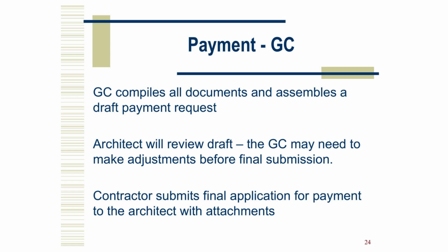Two, reconfirm retainage math line by line and in total. Three, confirm stored materials location, title, and insurance. Four, scan for activities over 90% complete and prepare closeout notes. Five, validate that change orders are integrated into the SOV and not orphaned. Send a clear cover email with the submission. State the period of work, call out notable changes, flag stored materials, list attachments, invite questions. Professional and short wins the day.